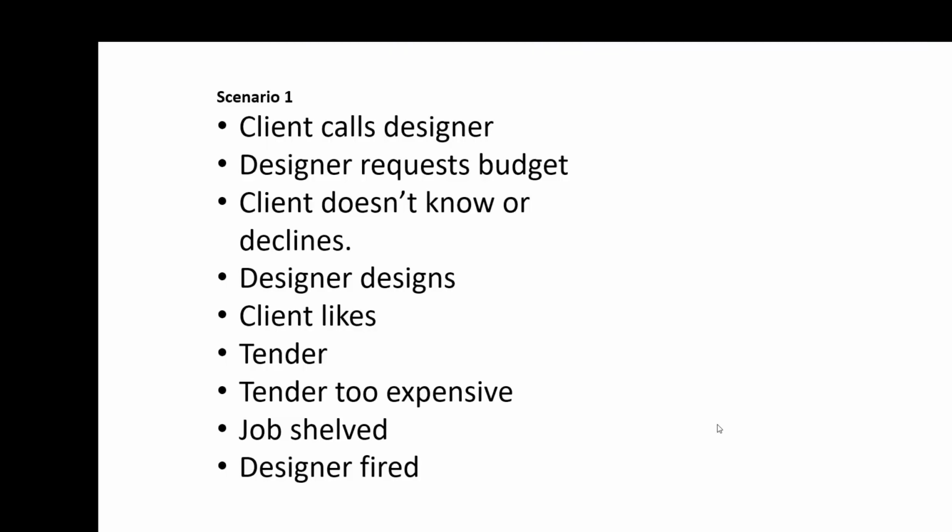So here's the scenario. The client calls the designer and requests a budget. The client doesn't know or declines to give a budget. They're often suspicious and don't give you the budget. So you go ahead without demanding the budget and you design it. The client loves your designs, says that's exactly what I want. How wonderful you are. You go out to tender to your favorite contractors and boom, the tenders come back. Big shock. They're too expensive.